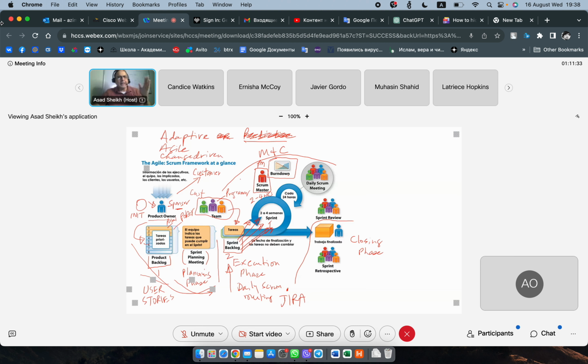So they look at how many hours were allocated to the 4 weeks, 80 hours or what? 80 hours is like the maximum, or 60 hours, and then they will look at these charts and see, okay, we've spent 30 hours and we've got 30 hours left, or we have spent almost 50% of our budget and we got 50% left. So these reports show how fast we are burning our dollars or our effort to produce.